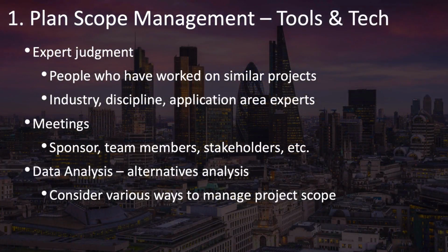The tools and techniques of plan scope management include expert judgment, meetings, and data analysis. You should consult experts within your organization and elsewhere who have special expertise in how projects and project scope should be managed, particularly those that have worked on similar projects. People that are experts in the industry or discipline or application areas that are specific to your project.